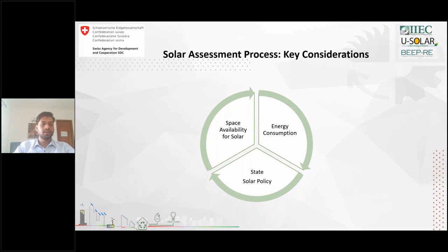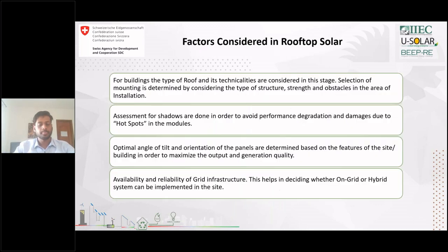Next we'll go through the state solar policies, whether any subsidies are available, if we can opt for net metering, and whatever statutory approvals need to be taken. And next we'll define the space availability for the solar. These are briefly a few considerations. We have highlighted a few of the basic factors which are considered during a solar rooftop installation.